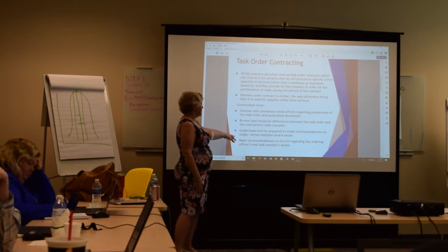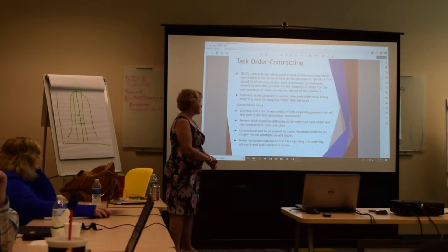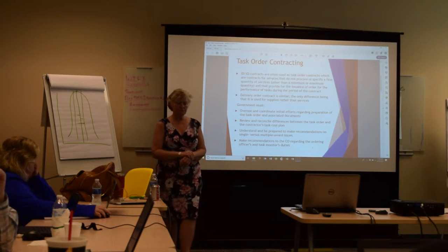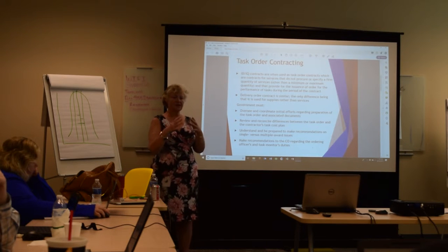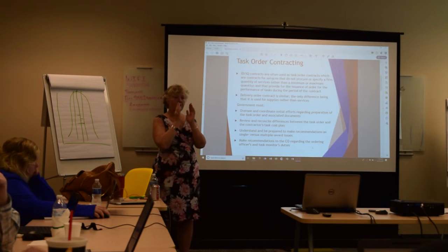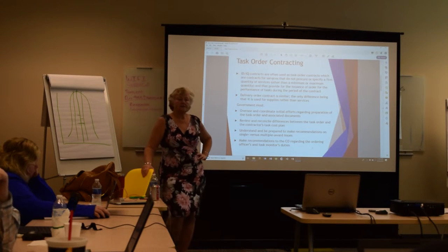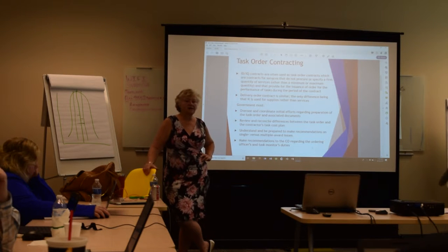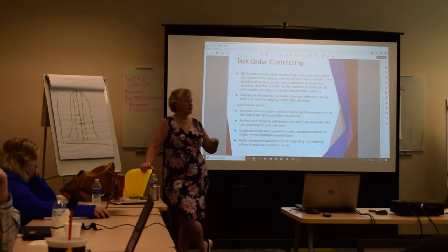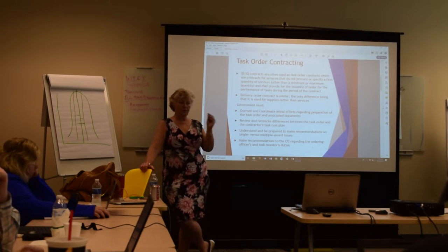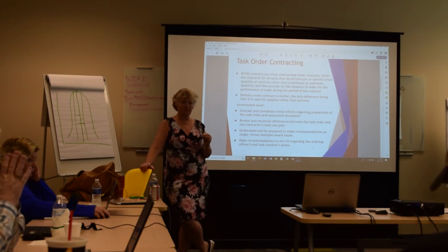They can only order this. And they have to make a recommendation whether they should do a single versus multiple award. So within an IDIQ contract that already has multiple companies bidding, they decide on an individual task order basis whether it should be awarded to just one company or multiple companies. Let's say, for example, they want the same exact service in San Diego and Norfolk. They could decide to award it to one company who can handle both, so that there's a lot of consistency between the way the work is being done.